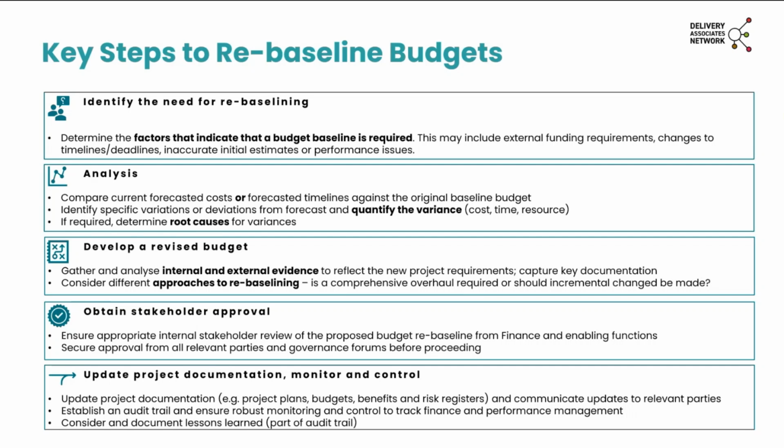Before taking the budget rebaseline to any forums, I would make sure that you are speaking to internal stakeholders to get their view or any challenge of the proposed budget rebaseline. So that may include consulting your finance stakeholders or any other enabling functions. It's very important to make sure that you have secured approval from those relevant parties and governance forums before you proceed with the rebaseline budget.